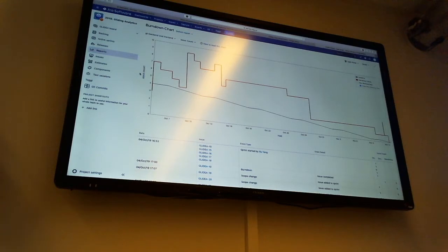So based on your experiences, if you were to redo this project again, what would you change? How would you work differently? I would say probably connect the different parts of the project. So the frontend and the backend and the Firebase and all that sort of stuff. Because it did take a while before all of that got connected. And even though we were helping each other and we had knowledge about each other's parts of the project, we did focus our attention inwards and working on our parts and then putting them together afterwards. So if we had, I would say that if we had connected them earlier, then it would have been easier for us to both do testing and probably debugging things. Because in the last week that has been our main focus. Or in the last sprint I should say.